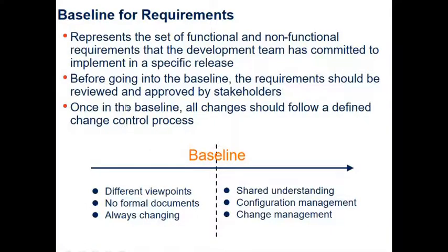So baselines for requirements. Baseline is a general term, right? It's not only used in software engineering or requirements engineering. Now let's look at baseline for requirements engineering specifically. Baselines in requirements engineering represent the set of functional and non-functional requirements that the development team has committed to implement in a specific release.